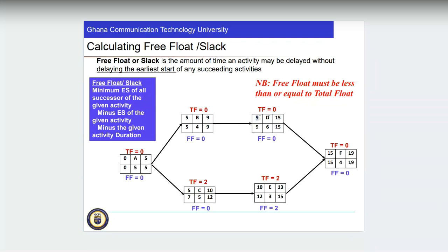Earliest start of this is 9. Earliest start of this is 15. 15 minus 9 is 6. 6 minus 6 is 0. Earliest start of this is 10. Earliest start of this is 15. 15 minus 10 is 5. 5 minus 3 is 2. And then that is that.